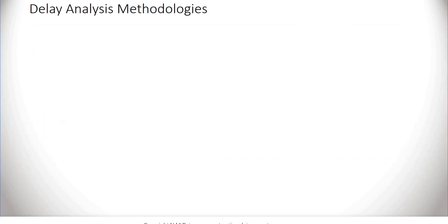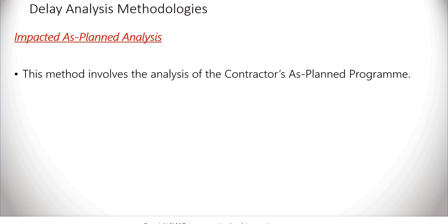Impacted as-planned analysis. This method involves the analysis of the contractor's as-planned program. Delay events are inserted into the as-planned program as time-duration activities, and the critical path is re-analyzed to ascertain the impact to the as-planned program.